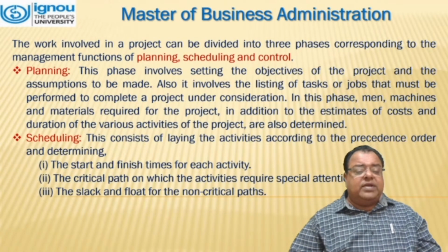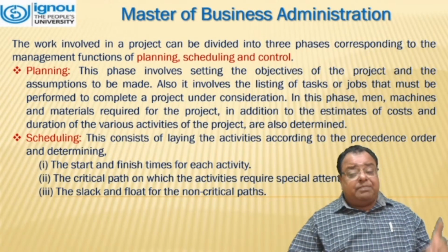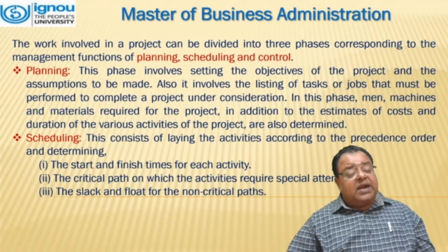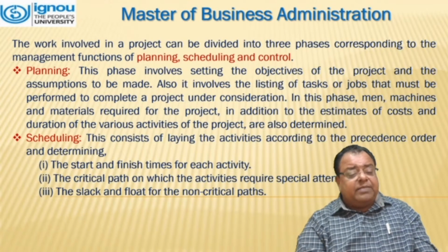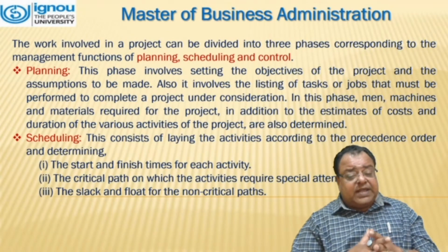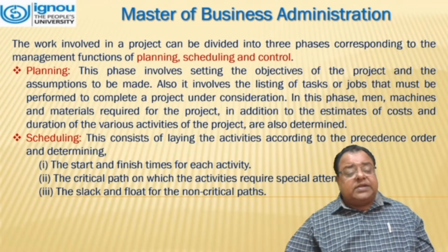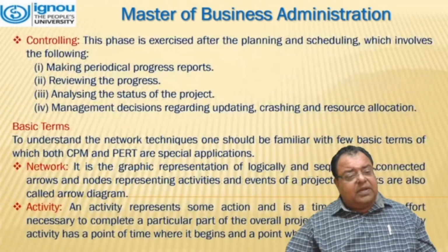Second one is scheduling. This consists of laying the activities according to the precedence order and determining the start and finish time of each activity. Secondly, the critical path on which the activities require special attention. And thirdly, slack and float for the non-critical paths.